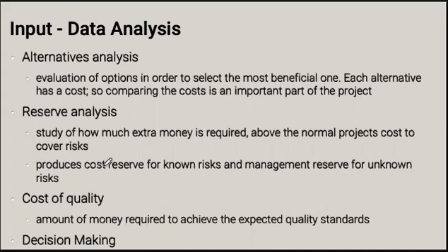Cost of quality is the amount of money that we would have to spend on achieving the required quality standards and also maintaining them. Everyone has to spend some money on cost of quality, whether it's for defect inspections, whether it's for reworks, and so on. And if we don't estimate this amount of money and we don't add it to the project costs, obviously our budget estimate is going to be understated. And things that should go into cost of quality include things like defect reviews, testing, as mentioned, rework, and so on. And we're going to talk a little bit more about this when we talk about quality management.